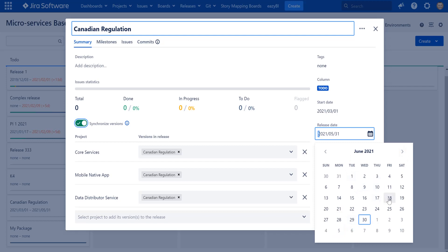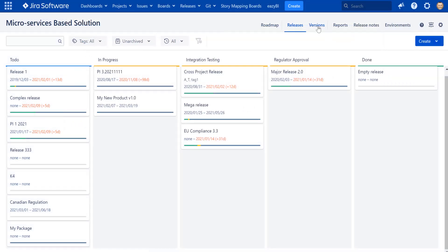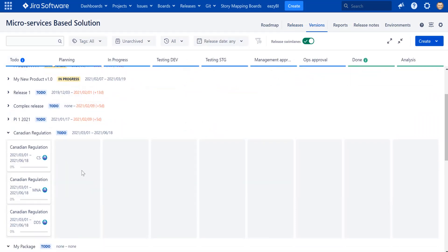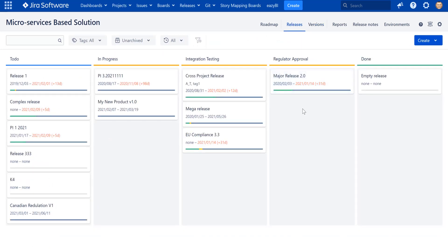Our ETA is not good enough and we may need to postpone the release to June 18th, so I'll update the date as well. Navigating back to the version board, we can confirm the spelling is now correct everywhere and the release date was also updated properly. If one version is updated independently, a warning appears at the release level indicating versions are out of sync, and you'll be offered to synchronize all dates across the entire release.